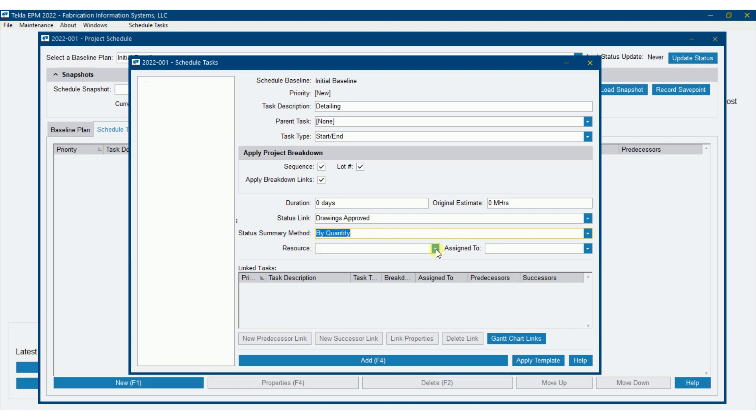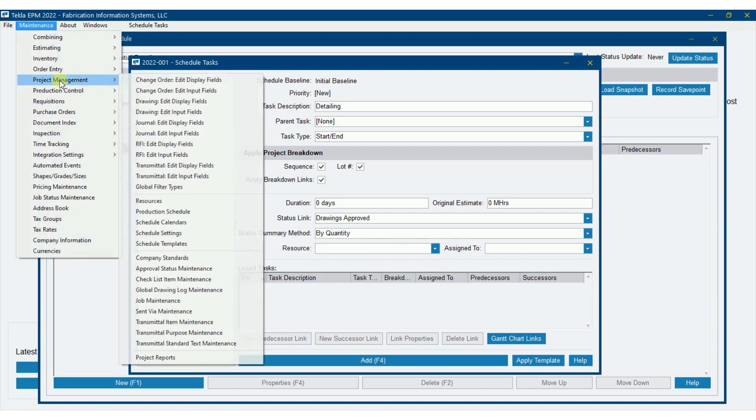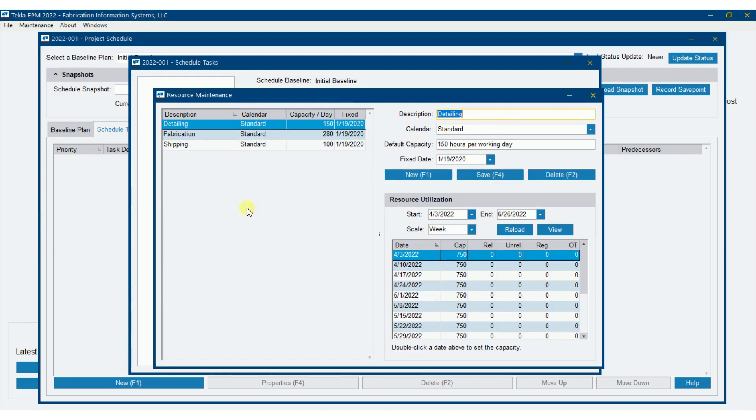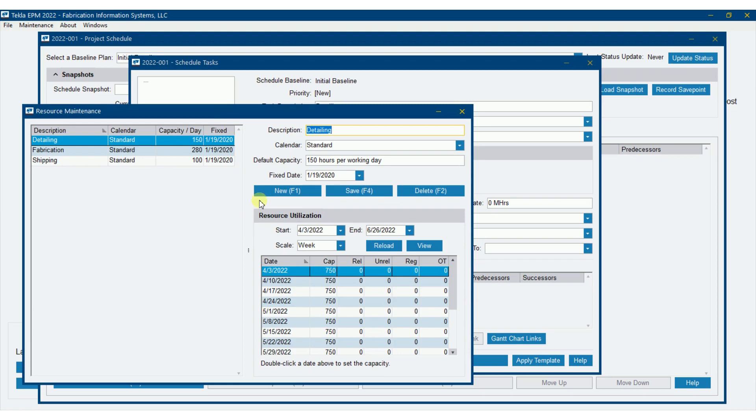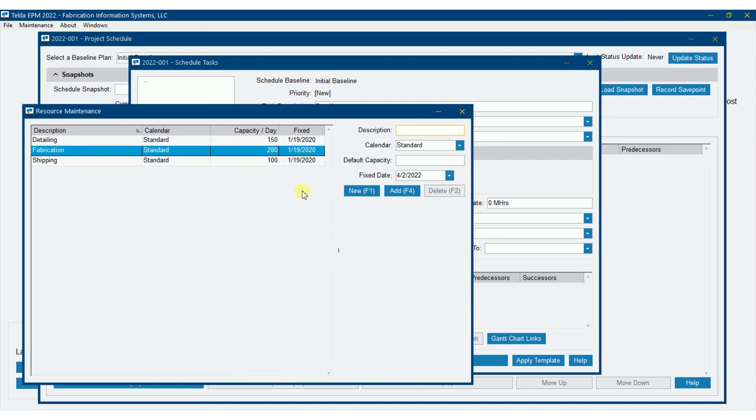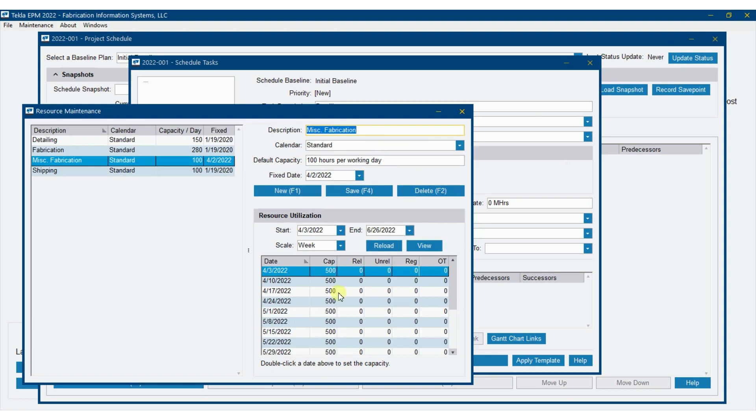Now I can also apply resource to this. So if you have your own internal detailers and you want to do a schedule for them, then you can assign a resource. Now those resources are also a setup item. If I go maintenance, project management, and resources, I can assign a resource here to it or create new resources if I would like to. So for instance, if I wanted to have fabrication, the structural fabrication, then I wanted to plan miscellaneous fabrication, I could do new miscellaneous fabrication. We'll get into calendar later, but I'm going to apply calendar of standard to it. Default capacity, I've got 100 hours a day. And add, and then now I've got 500 hours per week due to my calendar. And we'll get into that a little bit later.